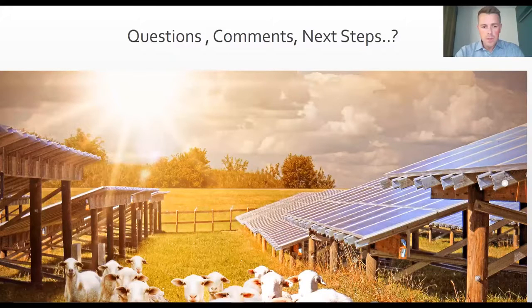Yeah, so based off of the case studies that I've been involved in and the historical data, if we just talk about high performance first, so driving energy efficiency down, there's a delta of about 5%. That's the industry average right now, and it might even be a little bit less than that, 3 to 5% now. So I think that's the first cost.